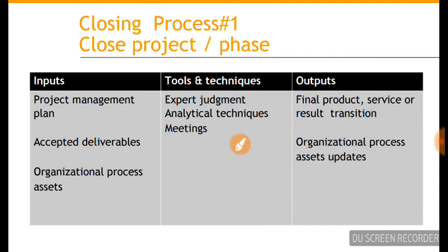Now, while closing the project, we may have to give a rating to the vendor. During the project period, if the supplier has given multiple deliveries to the team, for example a raw material supplier who has given several deliveries across a period of time, then at the end of the phase or the project, as per my organizational norms, I may have to do a performance analysis of the supplier.